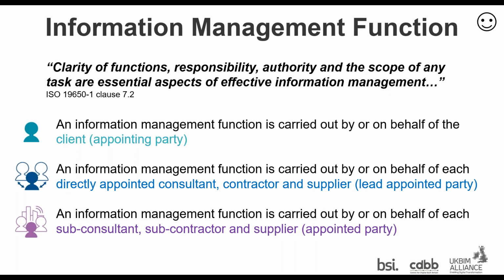So we talked about information management functions. So essentially, ISO 19650 Part 2, which is the process of project delivery effectively. Each one of those clauses in that standard, if they are engaged and procured by the client, again, these standards are supposed to be implemented proportionally and sensibly. So depending on the size and scale of the project, all of the clauses in that standard may not actually be relevant. But the point being that each one of them does need someone to take responsibility for it and do some work on it in terms of information management. So whether you're an appointing party client, a lead appointed party, or an appointed party, everyone has some responsibility for that information management function, and those clauses and activities will be assigned out appropriately. Moving on, Craig, thank you.